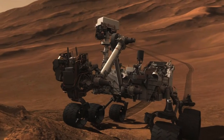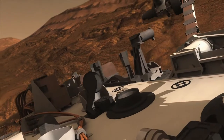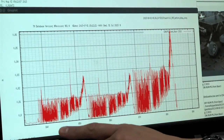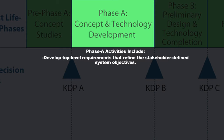For a Mars mission, stakeholder objectives might include looking for water on Mars or studying the atmosphere of Mars to understand its composition. The engineering staff then has to determine what requirements to levy on the system to look for water or analyze the atmosphere. You get into lower and lower levels of specificity on how the system needs to work to accomplish those high-level objectives, with top-level being the first level of requirements you define.